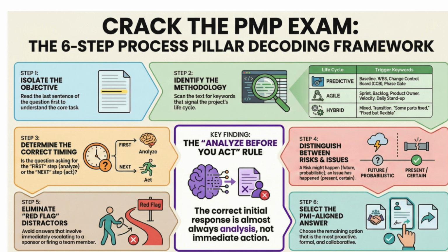What's the strategy once we see those words? The strategy has to follow that formal linear sequence. Everything you do has to be tied back to an approved document. If a change affects a baseline, it has to go through the CCB. The emphasis is all on documentation, control, and formal approvals.